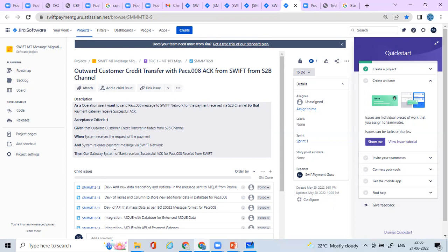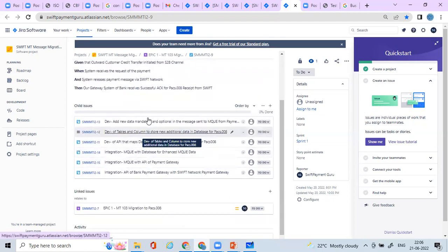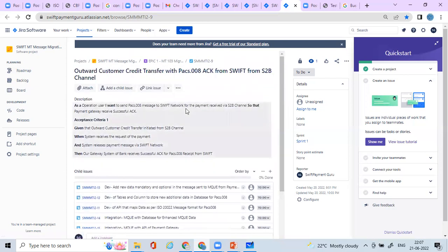And for that user story, you can have multiple tasks created for it: development tasks, testing tasks, and into the development again, whether it's for user interface or database or server logic code, right? If there are multiple applications which are impacted, all those tasks need to be created and assigned to the respective person. And that is how you will get this first user story done and dusted, right? When it meets the acceptance criteria, this will be done and dusted.